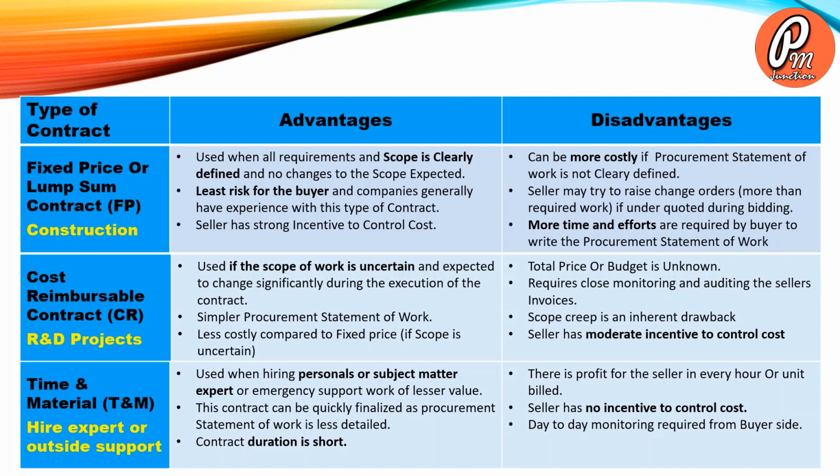The main disadvantages are: there is a profit for the seller in every hour or unit billed. Whether he is performing or not performing, the profit is going on. Seller has no incentive to control the cost. Day-to-day monitoring is required from the buyer side.